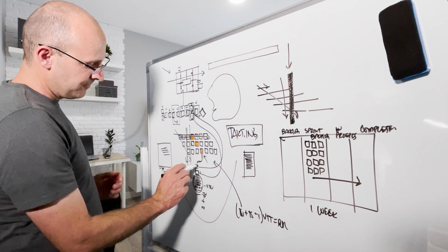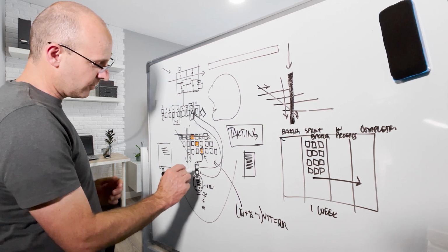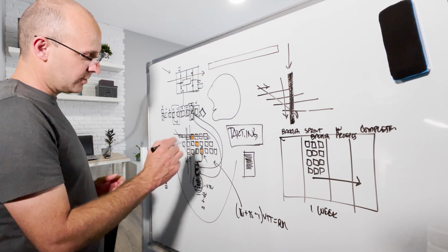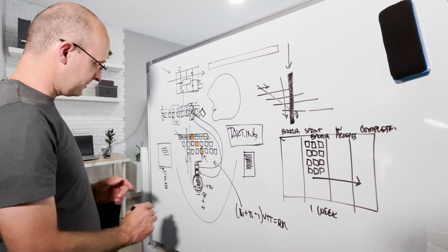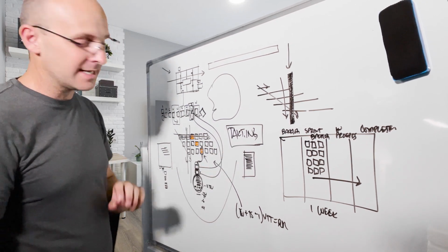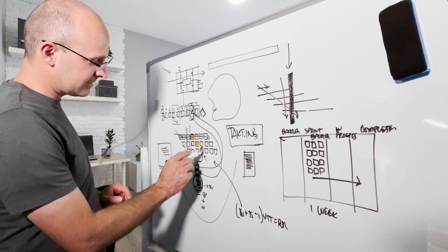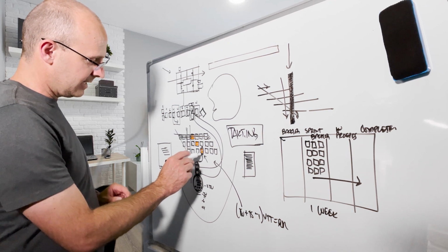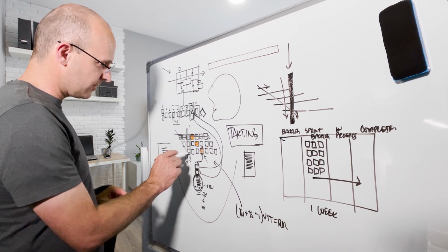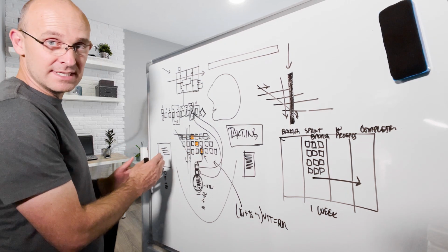Then each of these Takt wagons will have, right here, work packages, whether it's one or multiple, which have work steps. These work steps can either be cataloged in Excel or in a program like Takting. And like I said, if there's a preparation activity for this orange one, then that preparation activity goes into the work steps of a preceding Takt wagon in a preceding takt time.